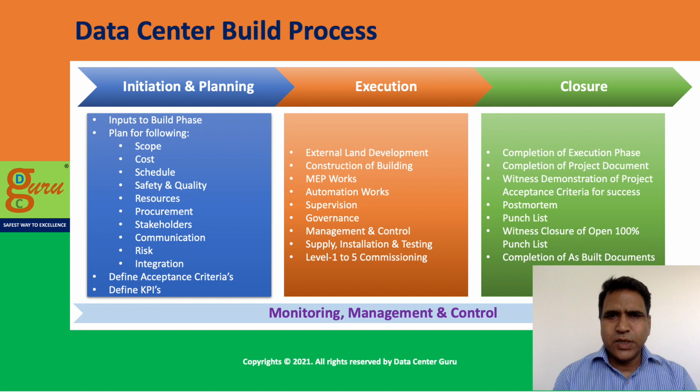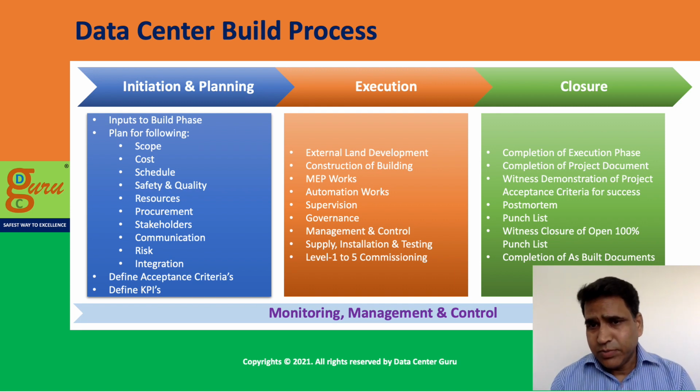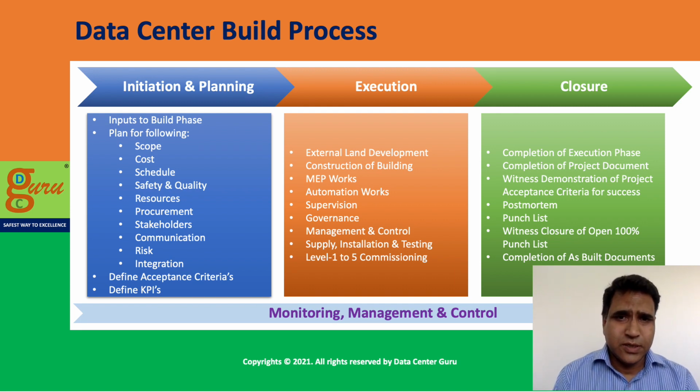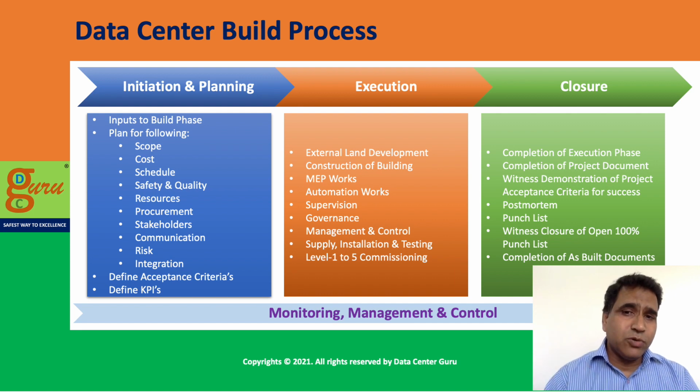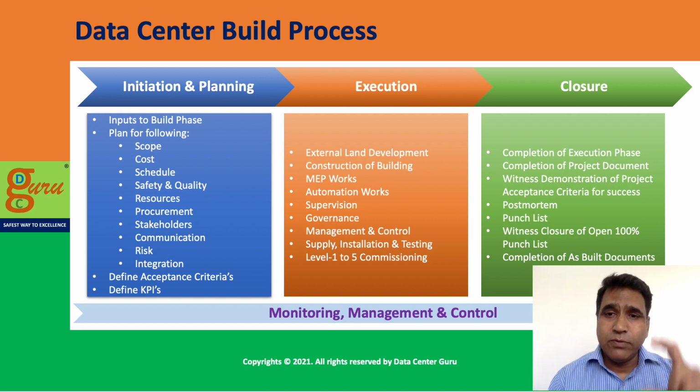So for commissioning, the 5-level commissioning process is very, very important in a data center. In the data center industry today, I found people directly jumping to level 5 commissioning, which is not the right process to follow, because if you jump directly to level 5 commissioning, you identify a lot of gaps at that stage which you may not be able to rectify.